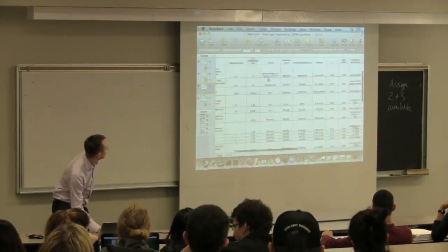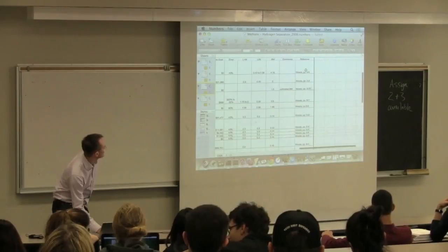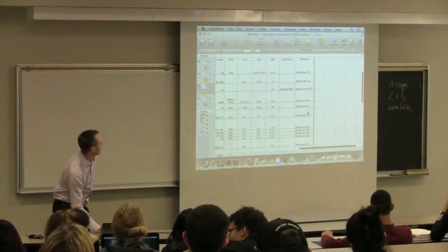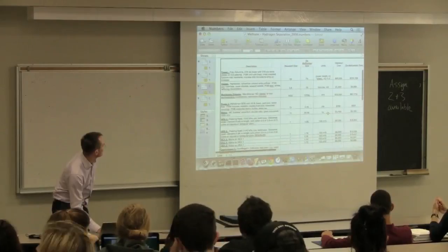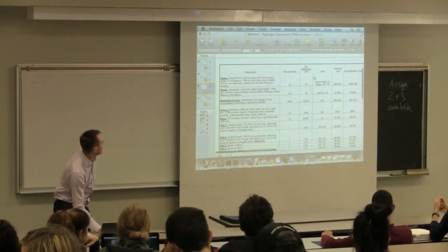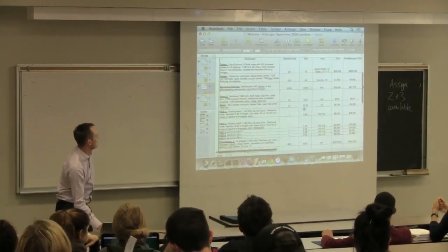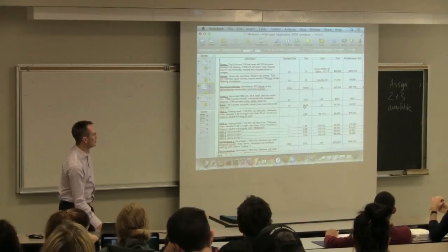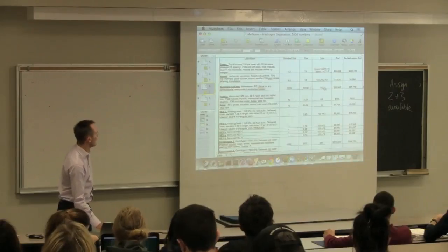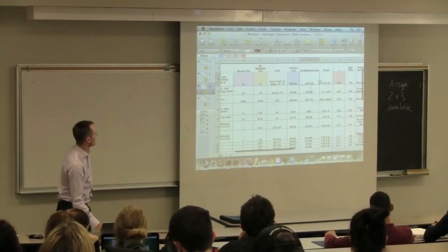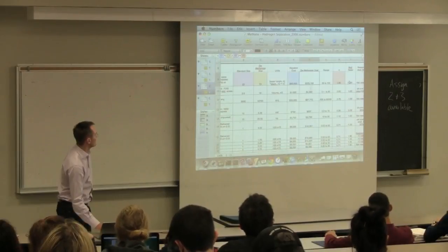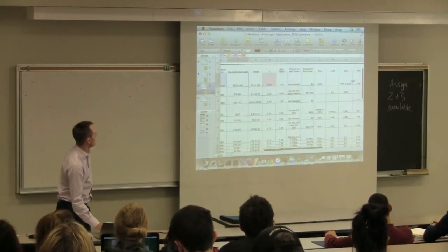Each row I have a unit. Right at the end there is a reference for the correlation. They all essentially come from Don Woods. It's from different sections. And for each of these units, you're estimating, get the standard size from that correlation, and then ratio that according to your unit size. There's the base cost. There's the scaled up cost adjusting for capacity with the exponent factor.